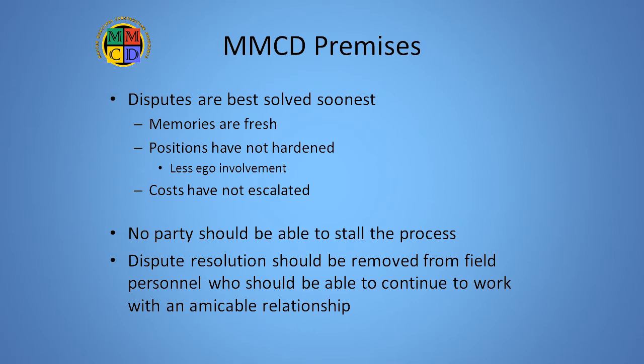Number three, finally, if the matter cannot be resolved quickly by personnel working together in the field, the dispute needs to be escalated. Having more senior people involved brings different perspectives and reduces the chances of damaging working relationships.